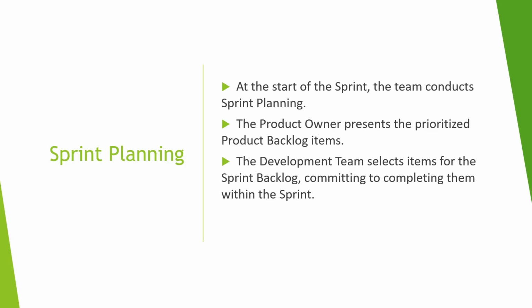The completion of the task, depending on your organization's goal, would be, is it the development completed or is it the QA completed? For me, QA should also be done when we are talking about the completion of the task, because non-tested items cannot be released to the user in the production environment.